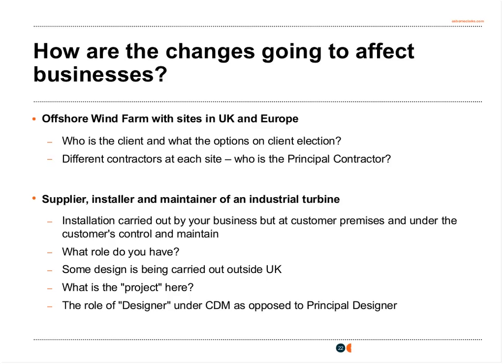And it says there that designer duties apply as soon as designs are prepared that are used in construction work in Great Britain, including concept design competition, bid for grants, and it goes on. So strictly, design work outside UK for construction work within the UK does fall within CDM 2015.